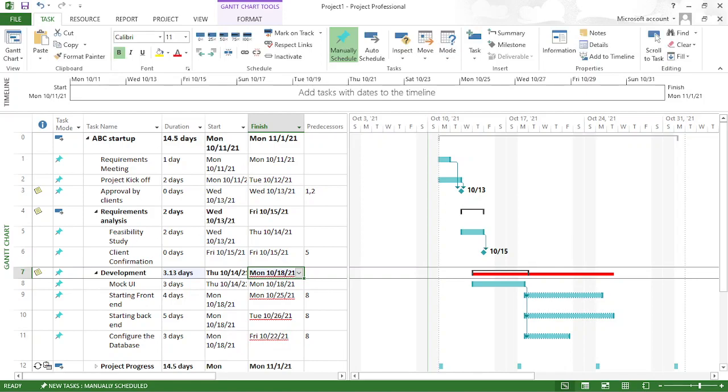Now what happens, the schedule automatically turns red. It automatically gives a warning that you don't have sufficient time, and you can see the umbrella shape ending here. After that cut, all the tasks get a dotted line. Have you seen this? Those dotted lines mean your project is at risk, you can't complete on time, right?